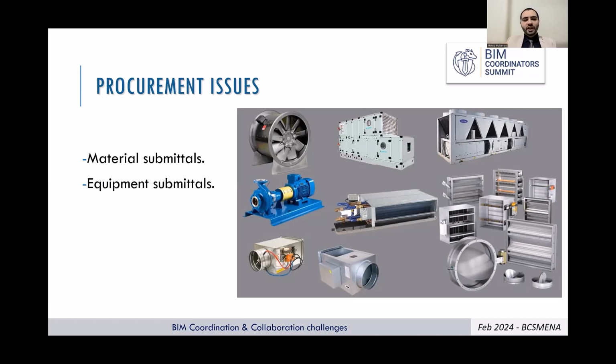But when coming to purchase after the approval, you find that you cannot import this machine nowadays, and you have to work with a local provider or locally available machines, and this machine comes with the drain pipes in another direction. So the coordination you have done needs to be changed, and this is a very strong challenge you have to face and manage in your models.